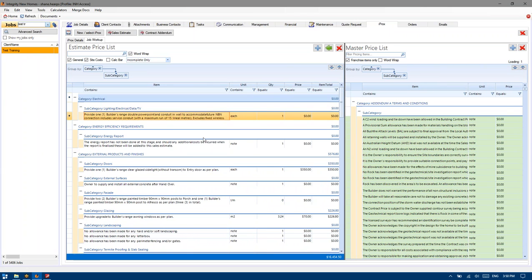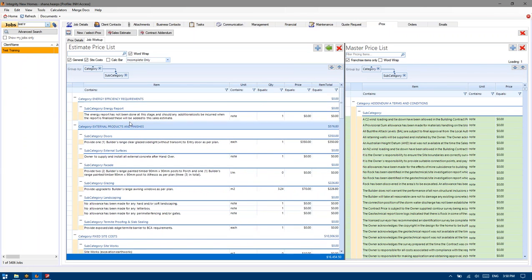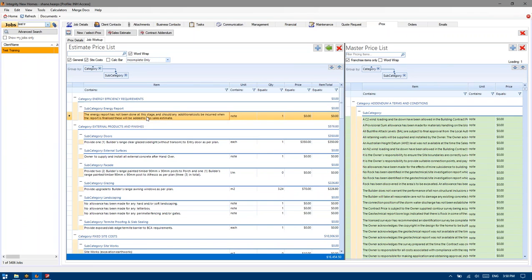So I'm just going to go right-click, mark complete. The energy report has not been done at this stage and any additional costs — well that's true. We've got nothing more than a plan. We don't have a BASICs and Nathers and ABSA. We've got absolutely no knowledge of where this house is ever going to be situated. So it's worthwhile making that statement — there's absolutely no provision for any upgrades to meet local authority requirements or energy requirements. Mark complete.